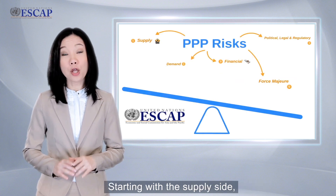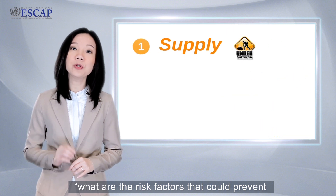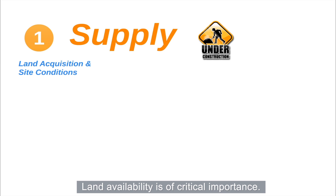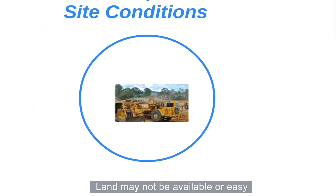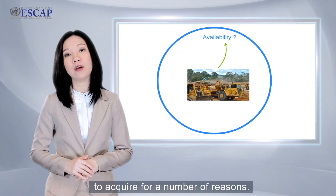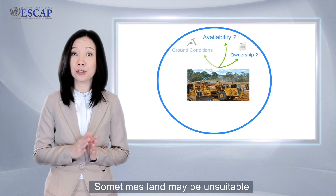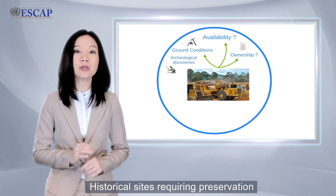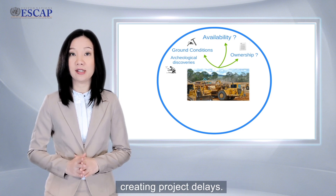Starting with the supply side, the question is: what are the risk factors that could prevent the public service from being delivered? Land availability is of critical importance — without land, no infrastructure project can be realized. Land may not be available or easy to acquire for a number of reasons. Sometimes land may be unsuitable or require restoration from contamination, or historical sites requiring preservation may be discovered, creating project delays.